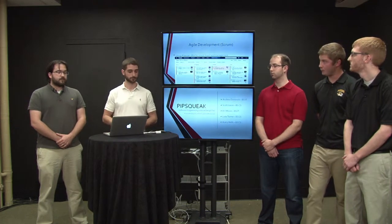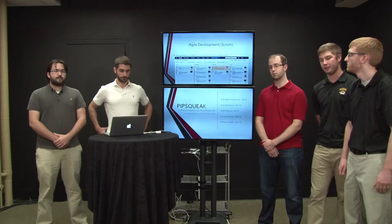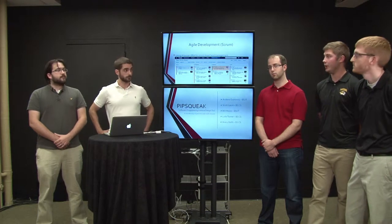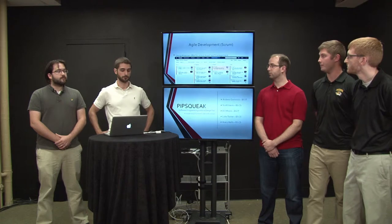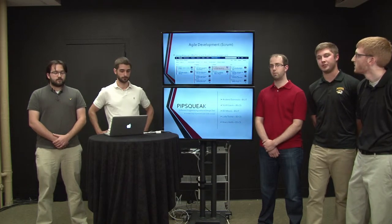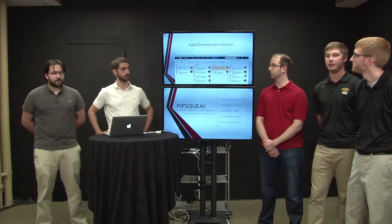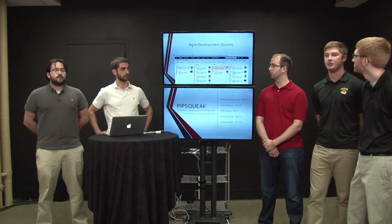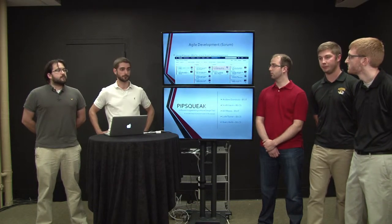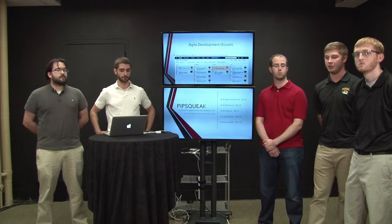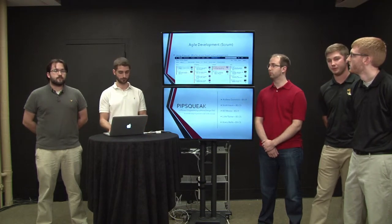For our Scrum management, we'll be using JIRA. We've already been using that this semester. This is an example of a Scrum board. JIRA also has functions for planning out your sprints so you can assign tasks, weight them based on their perceived difficulty, and we've been using that and will continue to use it next semester.